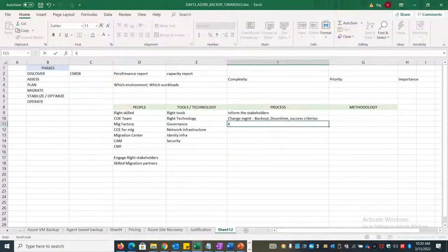And also we need to create knowledge management on the other side, meaning you have to create a lessons learned document. You need to create a lot of KB articles so that they can be reused. You need to capture the risk register, issue register, what decisions we are making, what problem tickets we have raised in the past, whether we have a root cause analysis done for that. So all these things will be very, very important. If there is a migration that is a known step-by-step procedure, you can also create a SOP, standard operating procedure, for that.